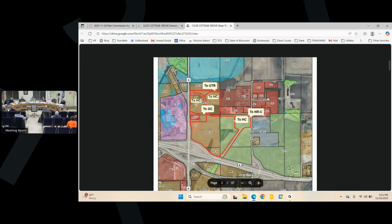And then you got a wall that you recommended maybe better have that graded rather than a wall. Yeah, I just pointed out a 15-foot wall, that there seemed to be a wall just to the north of the Paul Davis Lot 3, a retaining wall where the grades would change, presumably to create small, flatter lots on Lot 1 and 2 for buildability, and, you know, having a relatively tall retaining wall isn't necessarily the greatest thing.